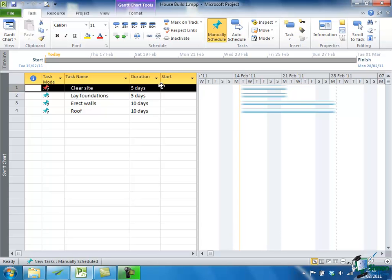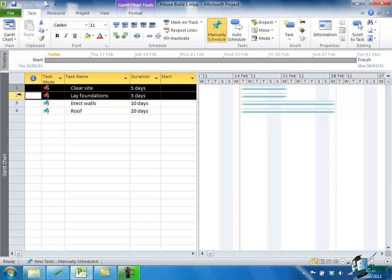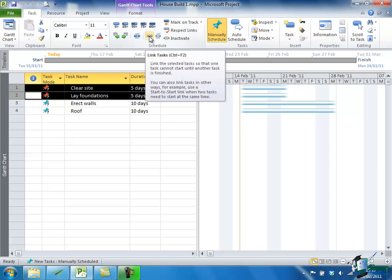If I want to select two tasks, which I do, if I hold the Control key down and select the second one, I've now got two tasks selected. And for these two, Clear Site and Lay Foundations, the second should start after the first finishes. This is a task dependency, and we'll spend quite a bit of time looking at task dependencies later on. But for the moment, we're going to say Clear Site happens, then Lay Foundations happens. Now on the Task tab, there is a command in the Schedule Group called Link Tasks. Link the selected tasks so that one task cannot start until another task is finished. The simplest way is to click this Command button and see what happens.